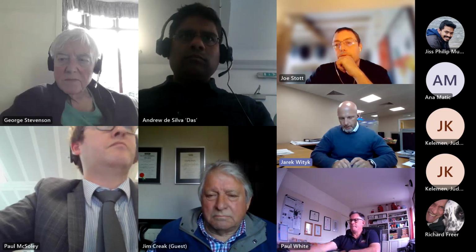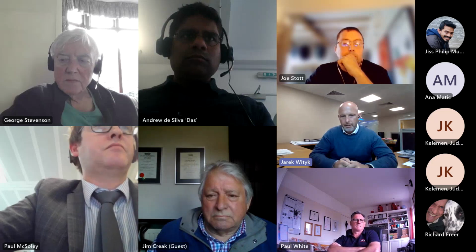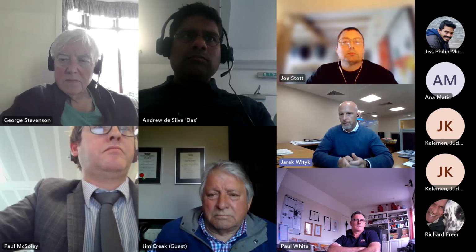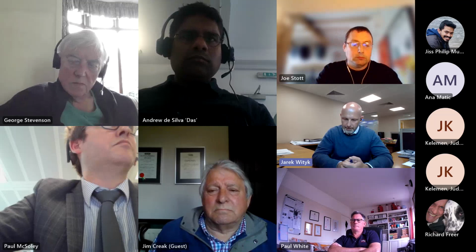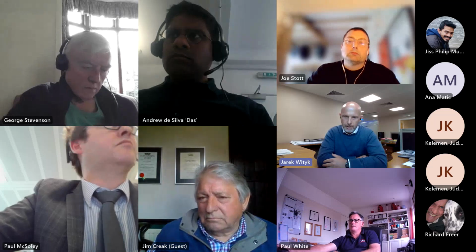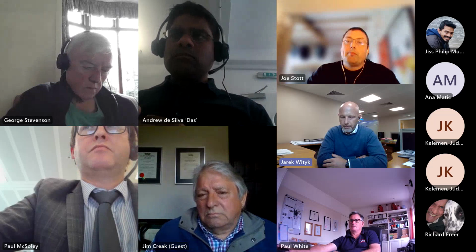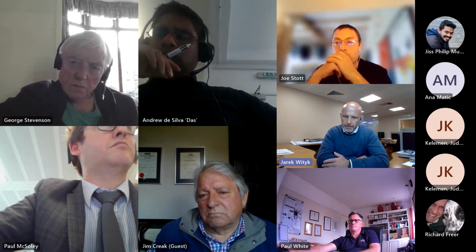Yeah, so it's true that many people don't even know about the regulation from where I stand, and don't know really what to do with it. Going back to your previous comments regarding how to capture the information, we work with a few contractors who do point cloud scans free of charge, because they can benefit financially from it afterwards, but they release the information free of charge. That's the only way to really capture the as-built information.